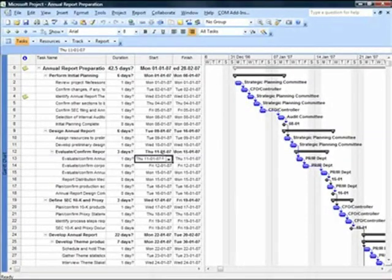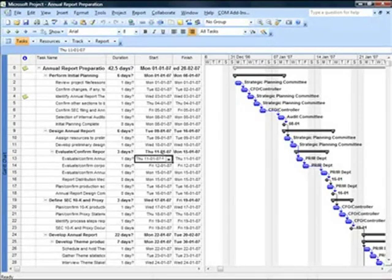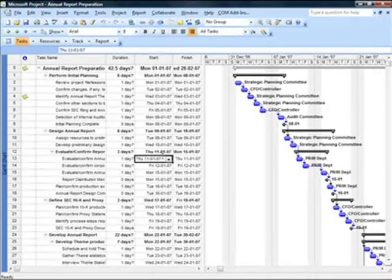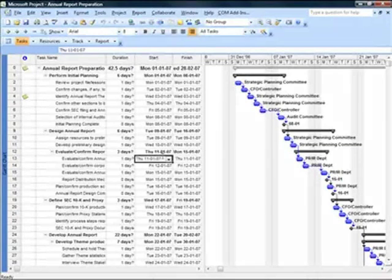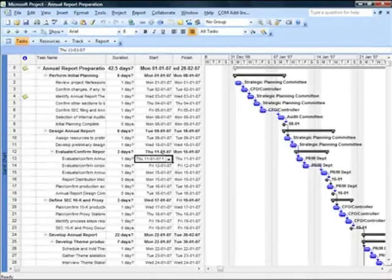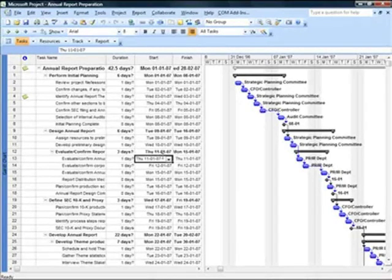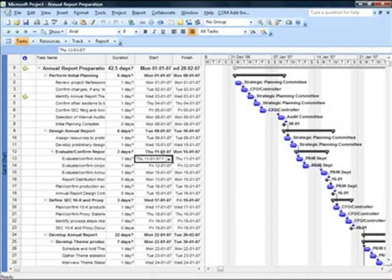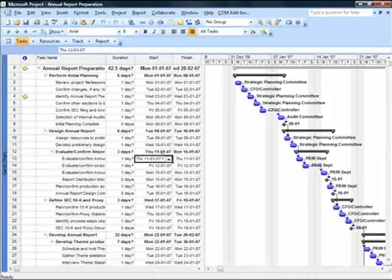In this video we will see how we can work with baselines. Once a project schedule is ready it's essential to save that project as a baseline. Project baseline essentially will store five things: cost, work, duration, start date, and finish date.